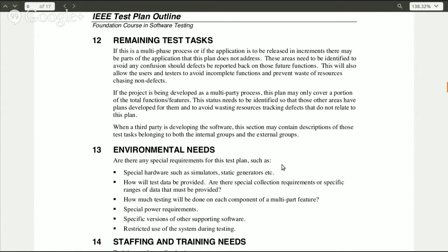And we're going to go ahead and test these items separately, rather than waiting for subgroups A through D to be completed to deliver the entire system. So at least you can have the testing done in a system viewpoint where you can still meet actual needs of your customer by getting them something that is functional and tested and secure before delivering the entire ordeal. Because maybe these systems all talk together, and you can say, all right, well, we're going to limit the risk of the final deliverable by certifying these subsystems up front, and we will make sure that the remaining systems are working before you get those.